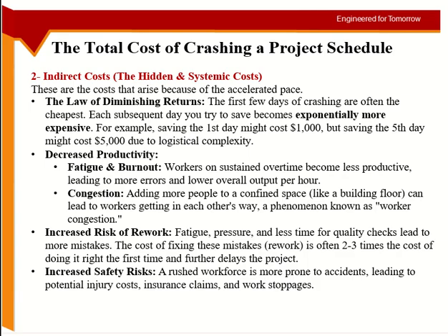labor comes in the morning, they start working, they spend 8 hours. Now you're asking them to spend 2 hours more. Okay, so these 2 hours are extra 2 hours. They are willing to do it because this will give them more money. But will they be the same? Will they give you the same amount of production, same amount of efficiency? No. So they are bound to make more mistakes. Okay, because they are tired, they are fatigued.